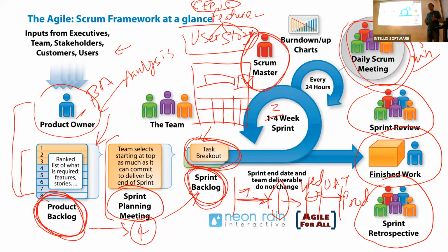If you overestimate, they'll figure it out. If people are pulling in 3 stories every week and they are halfway done, they say, oh, you better pull 2 more stories. So next sprint, they will add more, unless you're lying on burn down charts.